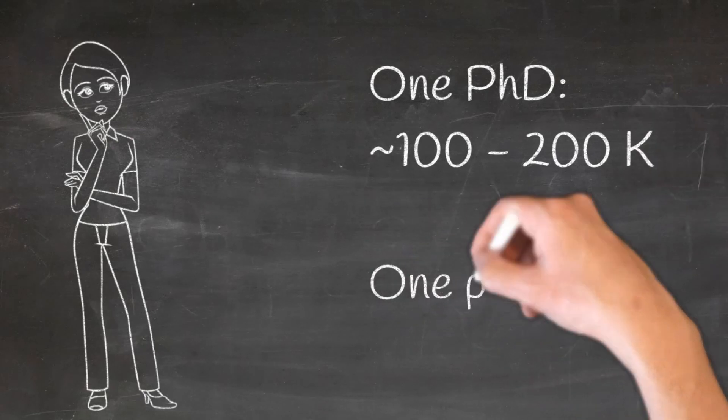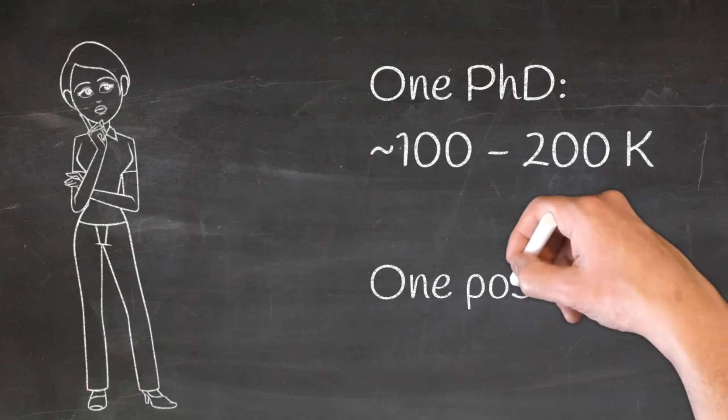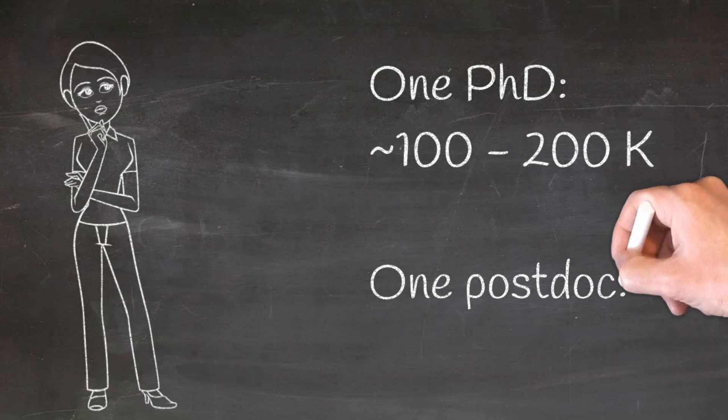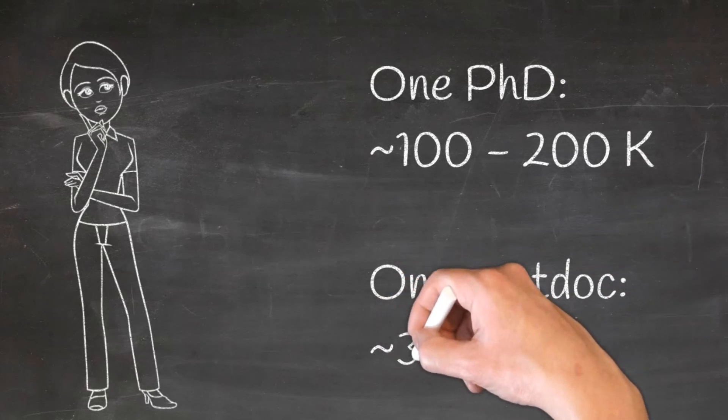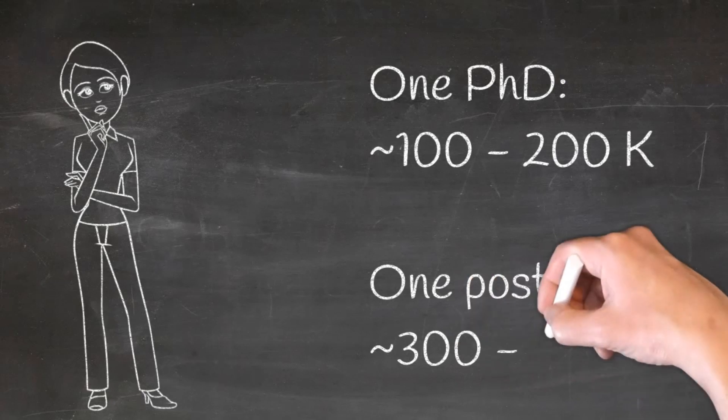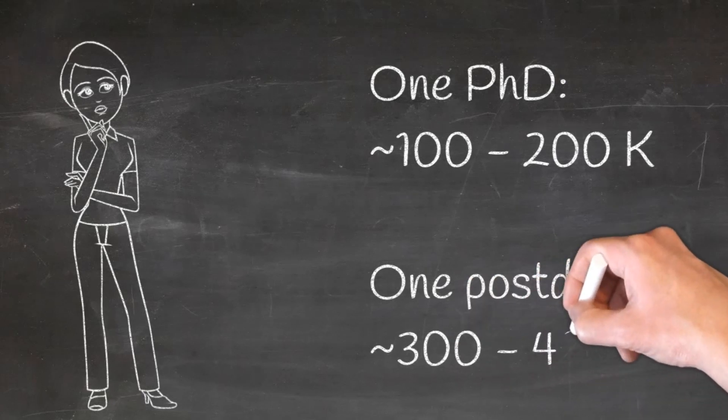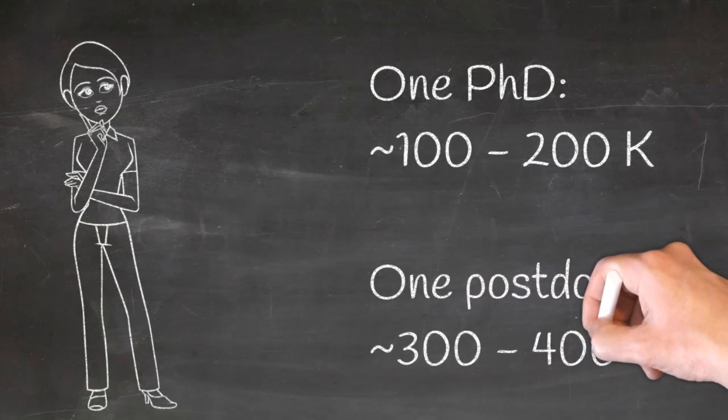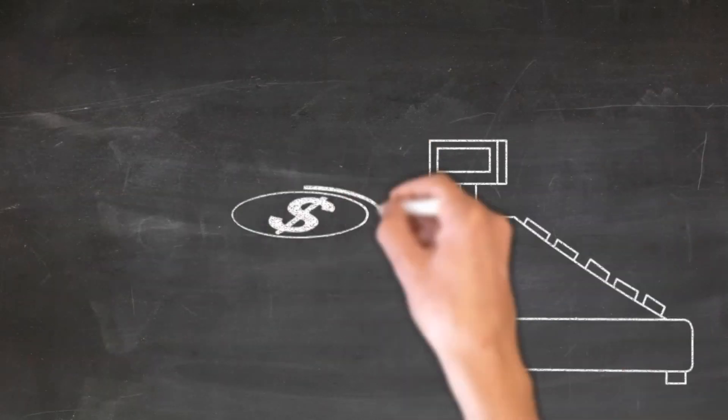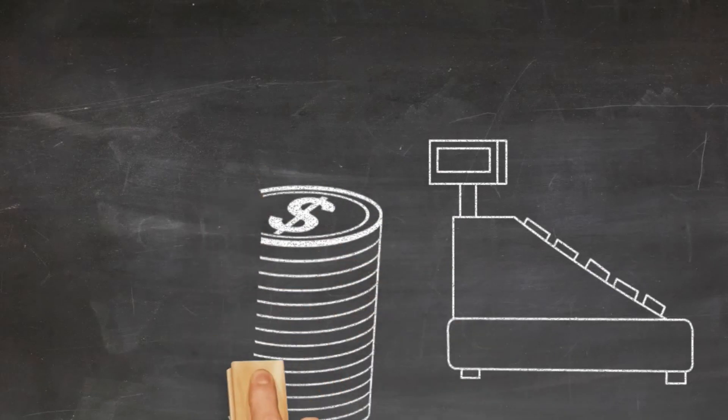So for a postdoc, it costs a little bit more. Postdocs are fully qualified, so they generally demand a proper salary. And that's where those overheads to the university really come in and do some extra costs around that as well. So you're talking about £300,000 to £400,000 for a full project that takes a few years to complete. And an example of my fellowship cost just over £300,000 for three years.